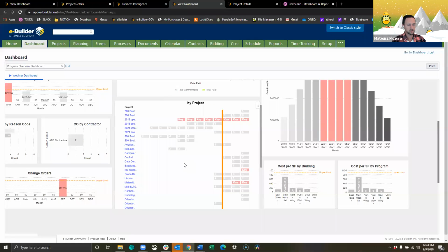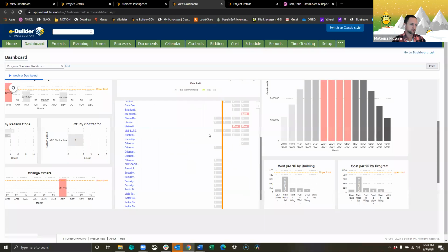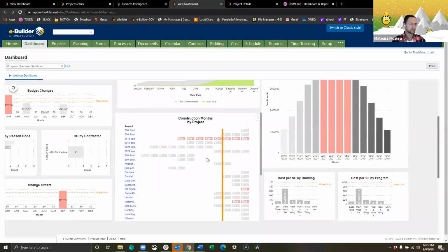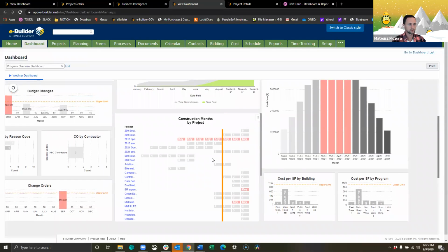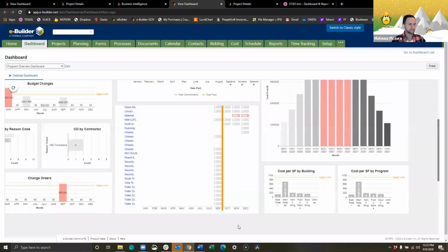But in this case, you can include this visual in your planning meetings with those internal teams, if you have them, and show them, hey, all the schedules are loaded. This is what we're looking at. This is how many activations we're going to have in this month. Can you guys handle it? Do you need to procure additional consultants so that you'll be able to handle this workload, or do we need to shift our schedules so that we can still make sure that this happens as planned?